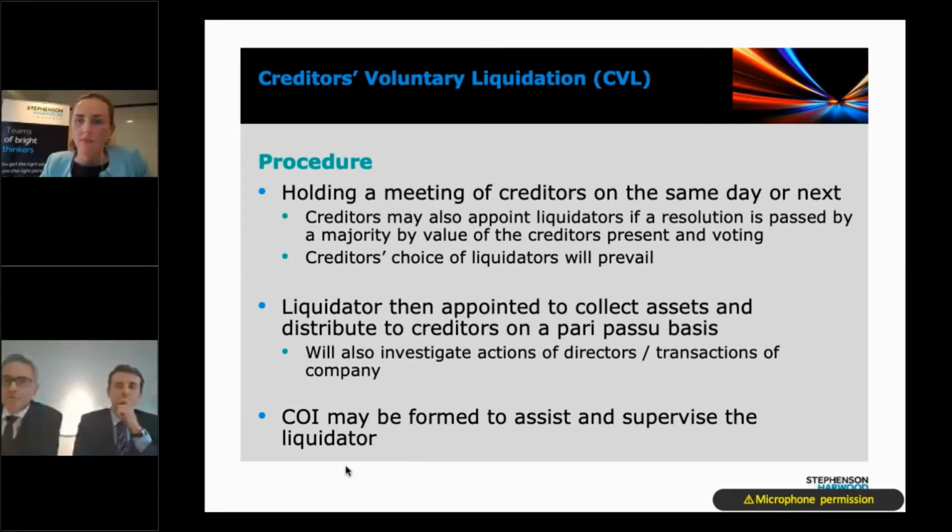When you do receive a force majeure notice, we would always advise clients to take it very seriously. You should straight away send out a holding notice to reserve your position, because if you do nothing, you may lose the battle effectively on the basis of acquiescence or on a deemed sort of waiver of your rights to challenge the notice.